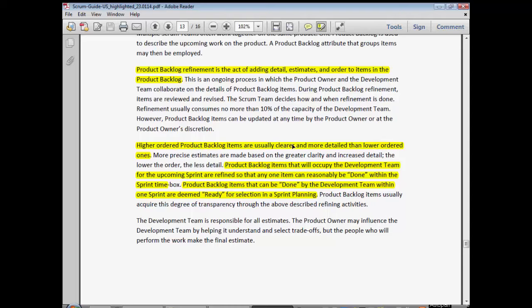Higher ordered product backlog items are usually clearer and more detailed than lower ordered ones. You would usually organize a backlog so that the highest priority items are what the team is about to work on. Through the process of refinement, you're making those items clearer — sometimes breaking down a larger item into two, three, or four different stories because they're too complex as a single one. Sometimes you're just clarifying the acceptance criteria, the title, or any detail so that when they come to it, they'll understand what they're doing.